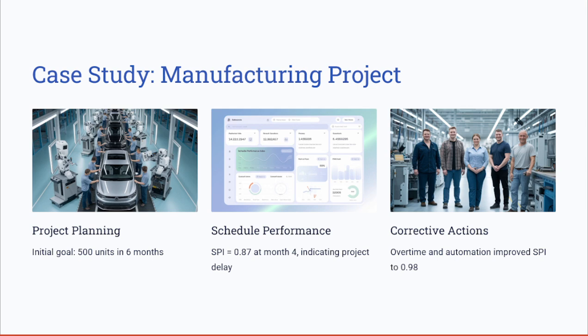But the actual value or the earned value, where the project was running, shows that the earned value was only 58%, and the number of completed units was only 290 compared to the planned value, which is 335 units. To calculate the SPI, we said the earned value divided by the planned value, so 290 divided by 335, you get 0.87, which means behind the schedule.